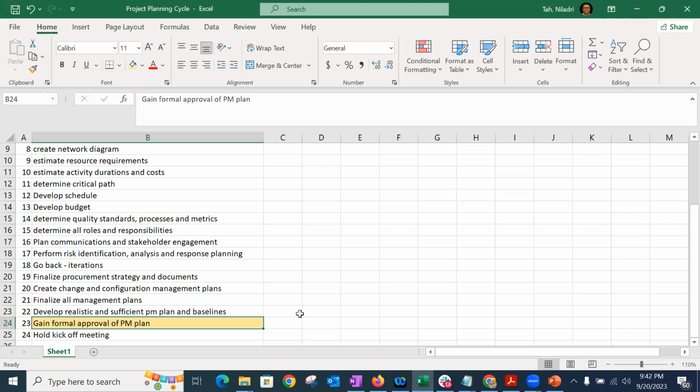But if you're working for an external client, especially for a service based kind of company, then you have to have a project plan which is signed off by somebody in your company, the delivery manager, and the delivery manager of the client company. You both will be signing that off, and this is the project plan which is agreed with scope, time, cost, and every detail of the plan which is being frozen.